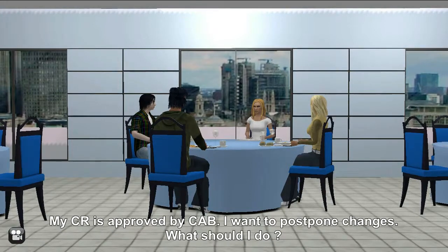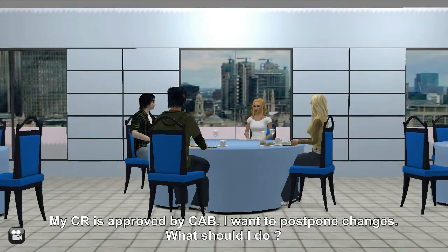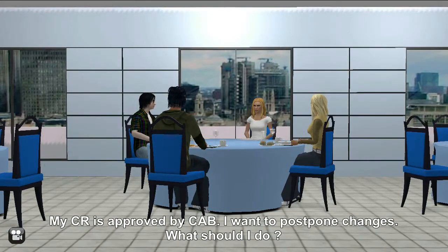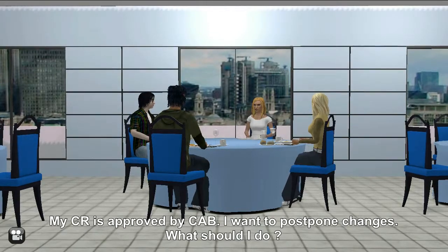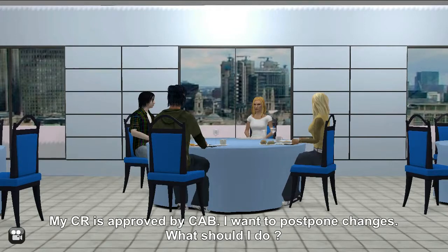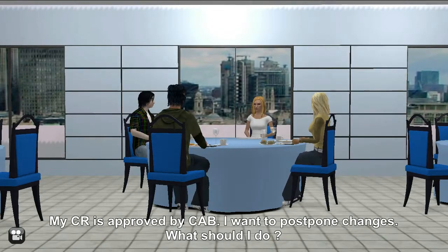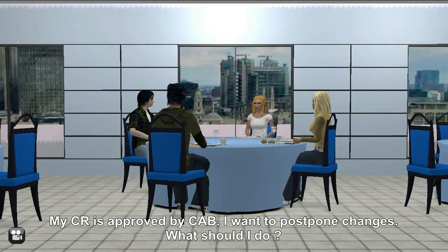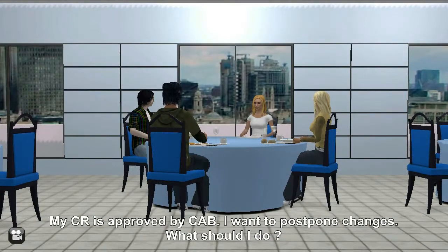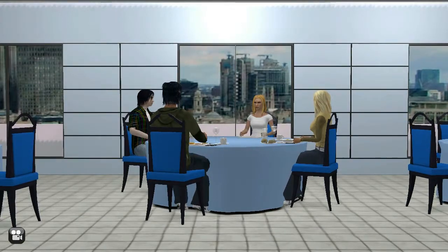Additionally, if the CR needs outage, approval is needed. In case the CR needs to be deferred to a date beyond next CAB date, please do let Change Management know that the CR should be presented to CAB for reapproval. Note that CAB approval once received is valid only until the following CAB meeting.